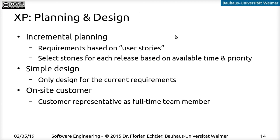We use user stories and, based on these, do incremental planning — no fixed plan up front. For each release every two weeks, we select from existing user stories those we want to support based on how much time each would take to implement and what our priorities are. The software design should be kept as simple as possible; we don't try to anticipate future requirements, and if necessary we'll do some refactoring later on.